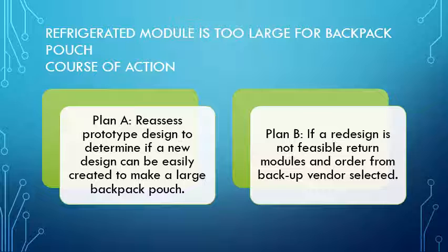I called the company to determine if smaller modules were available and explained our problem. Upon discovering smaller modules were not available, I moved to Plan A. As the project manager, I consulted with the design team to determine if a redesign could be completed to alter the backpack to fit the larger modules. Because of the cost of additional materials and time associated with ordering, this was not an option.